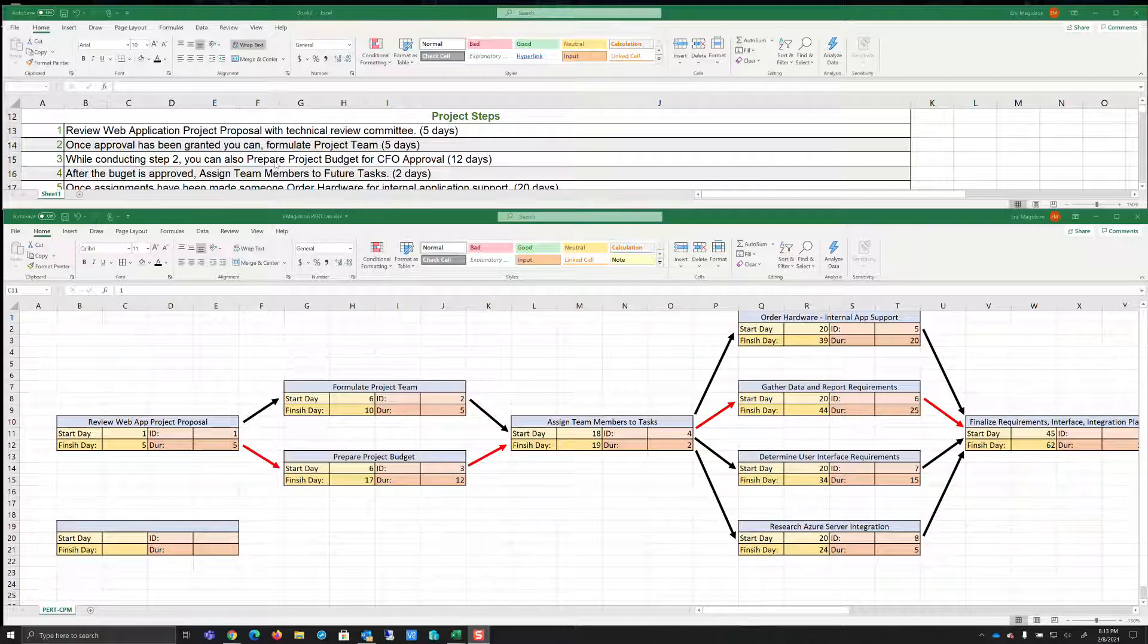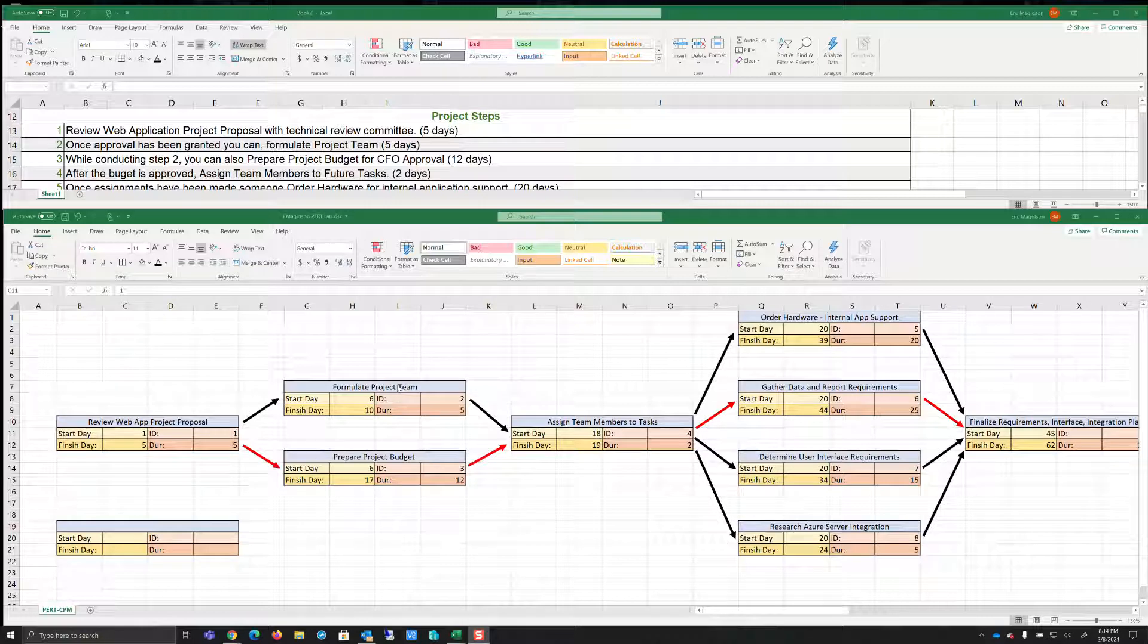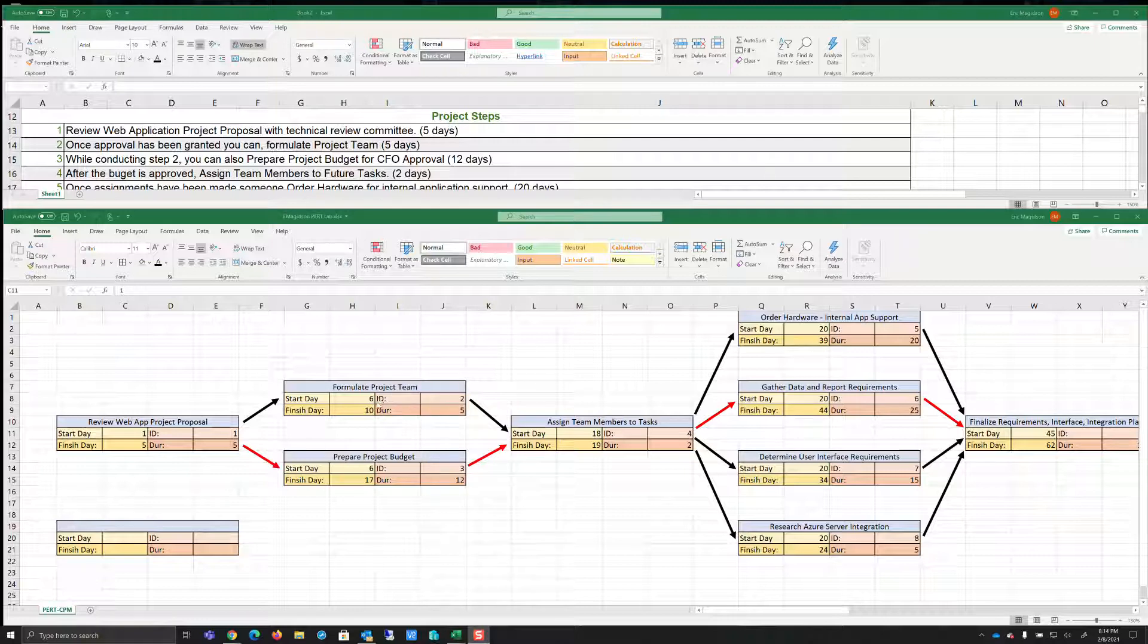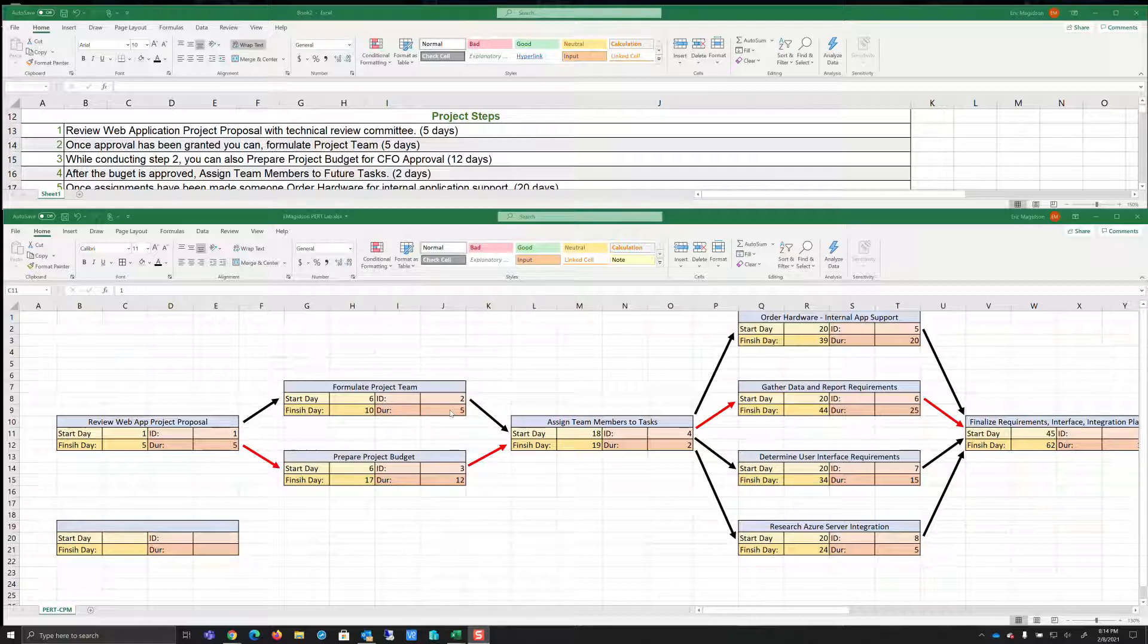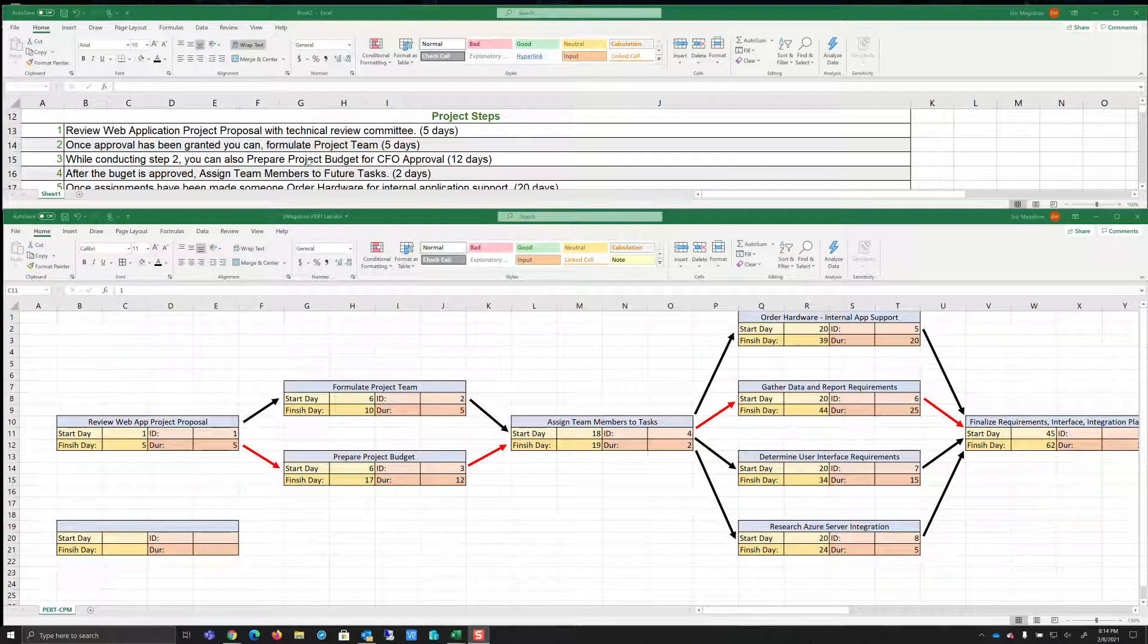It says once approval has been granted. So we know this has to complete before I can start anything else. It says you can formulate the project team. It also says while conducting step two or task two, you can also prepare project budget. So we can do both of these at the same time. You'll notice that formulating project team is five days, but in fact, preparing project budget for CFO approval is 12 days.